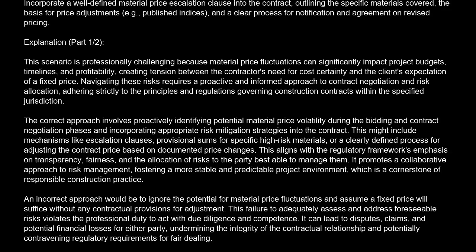The correct answer is B. Incorporate a well-defined material price escalation clause into the contract, outlining the specific materials covered, the basis for price adjustments, e.g., published indices, and a clear process for notification and agreement on revised pricing.